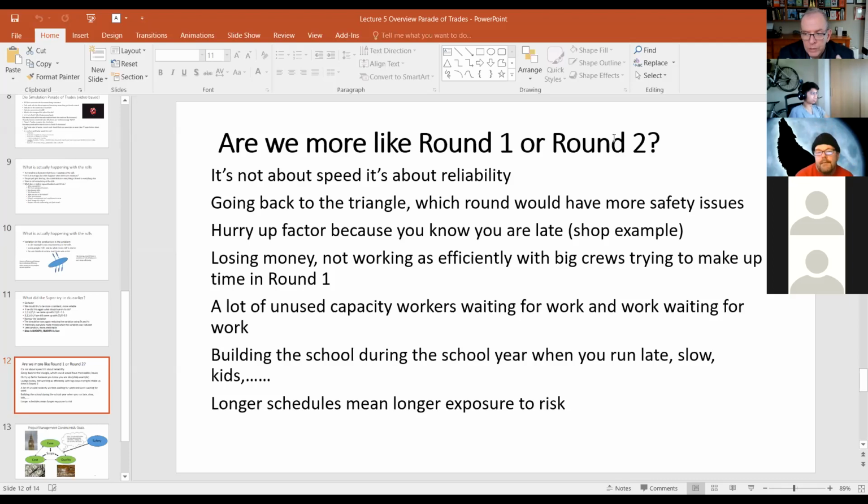So what's the most responsible time given your knowledge of this supplier? If it's a supplier you deal with all the time, it might be the day before. If it's a long lead item, it might be the week before. But you're trying to look at what is the most responsible time. So if I'm going to give myself a buffer, what makes sense? And you're giving a lot of thought to it, and you're making your subtrades think that way too. And you've got a process and system for that so that you can ensure that those discussions take place.